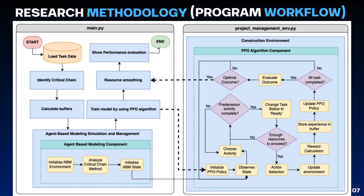The model workflow starts by loading task data and identifying critical and non-critical chains to define key tasks. Buffers are strategically positioned to handle delays. Using agent-based modeling, scenarios are simulated for resource optimization. The PPO algorithm then dynamically manages scheduling, tracking tasks and adjusting strategies through continuous feedback. The process concludes with resource smoothing and performance evaluation, refining efficiency with each simulation.